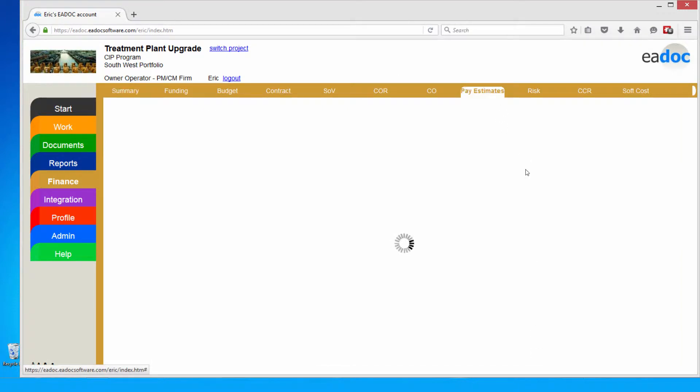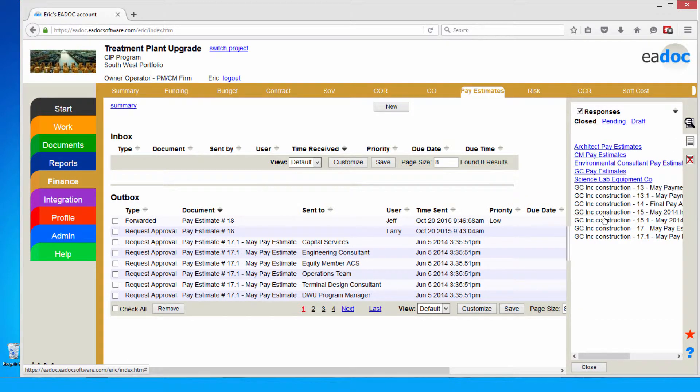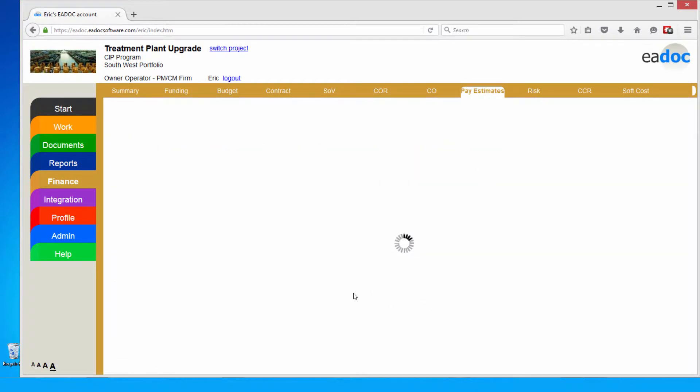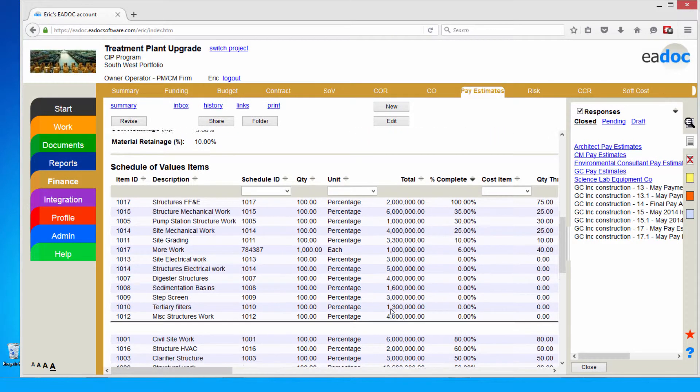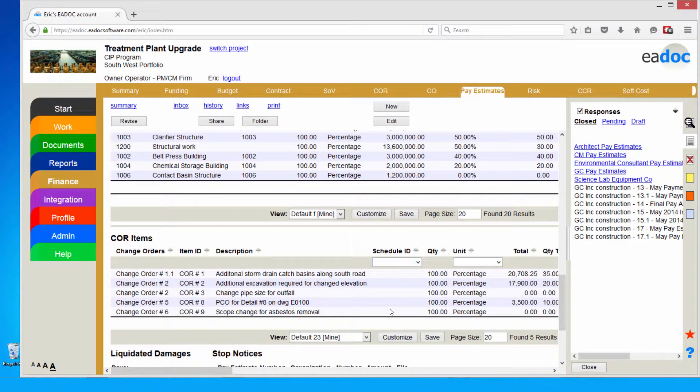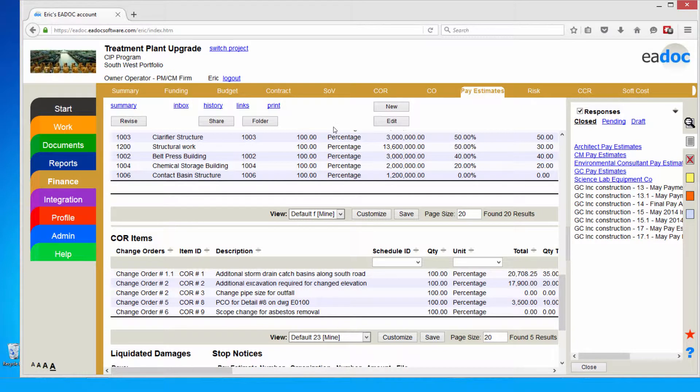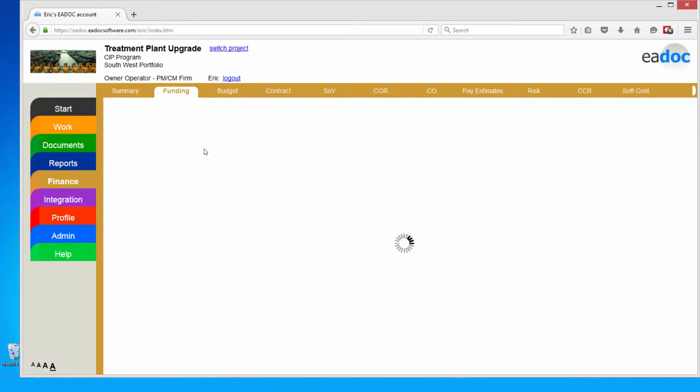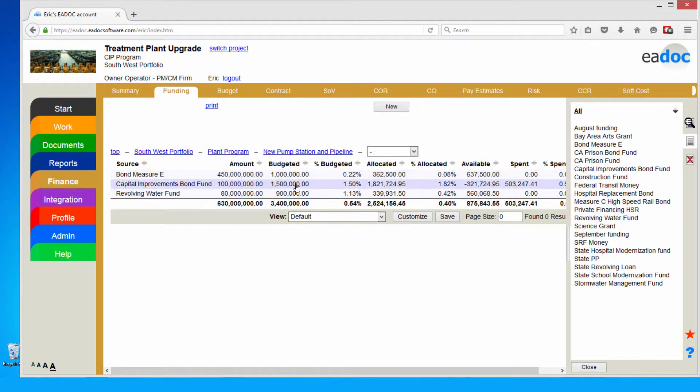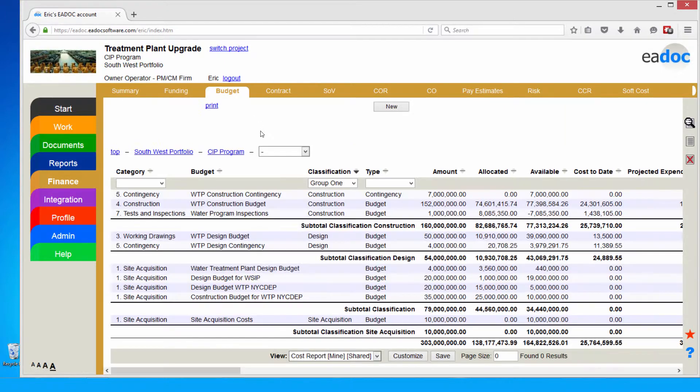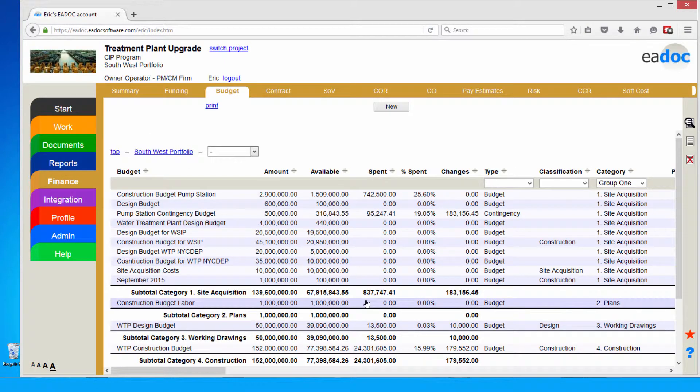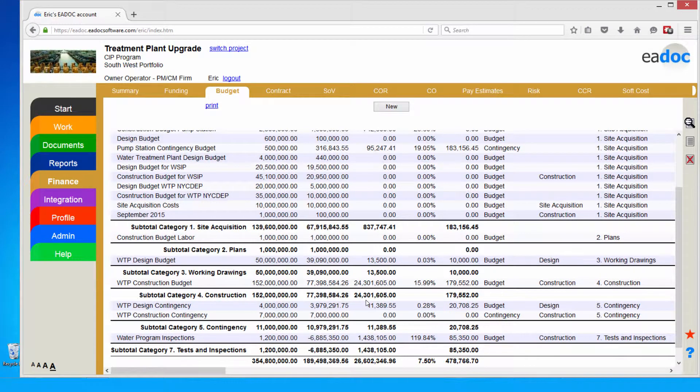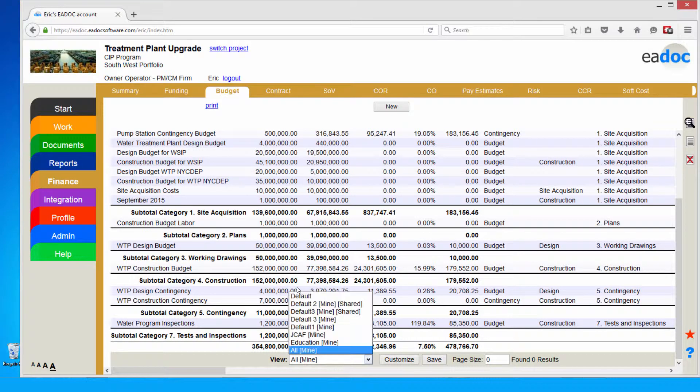I can even take it a step further with those changes. I can have my contractors and consultants submitting their payment applications to me through the application. This way, again, I'm doing reviews and approvals here on the app to see exactly how the project is progressing. I've got my base contract work and then any change orders once they're approved become line items on the contract. We can print this out to an industry standard form or a client-specific form here in the app. The other thing about our finance module is not only can I do financial reports and risk and pay apps and change orders, but I can also report against funding sources. I can manage the different pots of money here in the application or the funding sources for a particular project or program. I can take a look at my budgets coming out of those funding sources, how much has been allocated to contracts, what's available and how much has been spent. I can also set up my own budget codes here in the system as well. Keep in mind, these can be project-specific budget codes or they can be global codes across an entire portfolio or across your account. There's lots of different ways to track your costs and expenses against those codes and then summarize and report on that information. All these reports are configurable by the users that have access to this information here in the application.